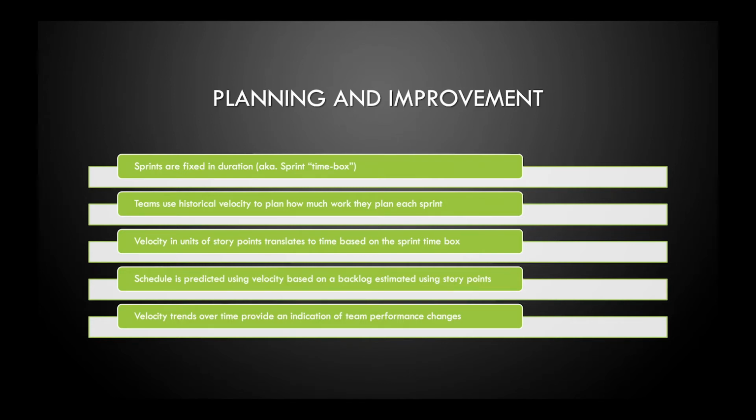The other major benefit is that a team can use velocity data to determine how it is performing. Velocity can be reviewed at the sprint retrospective in order to set the stage for improvement discussions. A decrease in velocity over time is an indication of issues such as low quality resulting from too many bugs, which erode the team's capacity to produce value. As the team implements improvements such as CI/CD, automated testing, environment standardization, or architectural changes, the effectiveness of the improvements can be determined by measuring the increase in velocity.